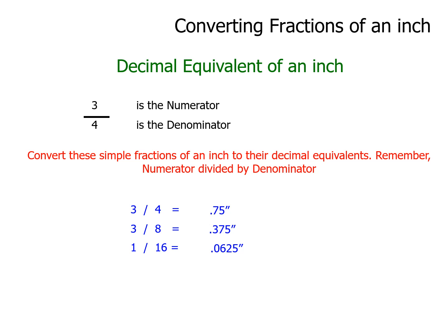Here's a 20-foot diameter circular patio slab. Well, I'm just doing 20 by 20, and how thick is it? Now, some of us are going to say, well, that's pi r squared, pi times the radius squared times the thickness of the slab, and that'll give me an exact quantity. Okay, but what's the minimum load you can order? There are a lot of variables that go along with that, but the math is exact.